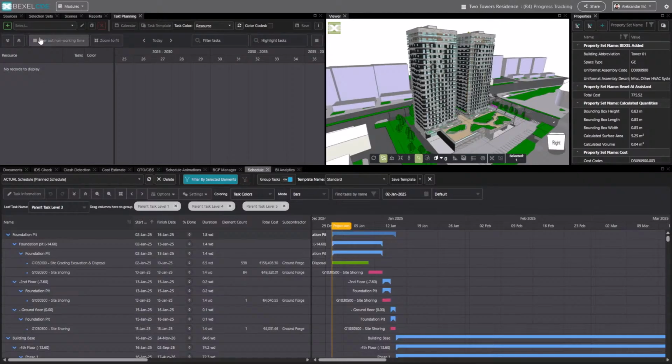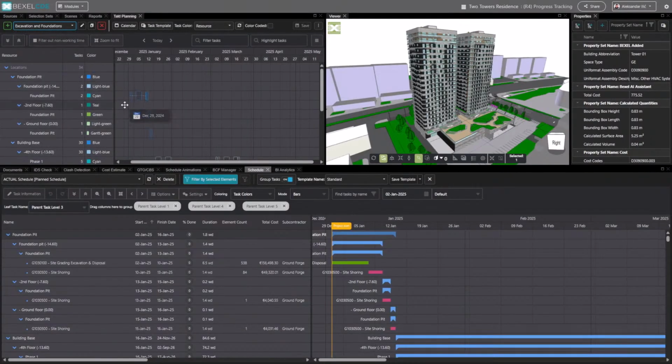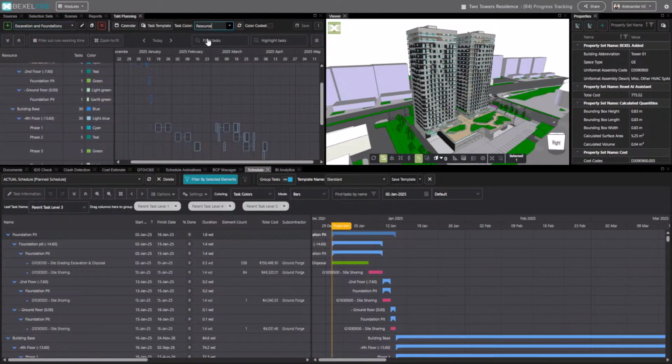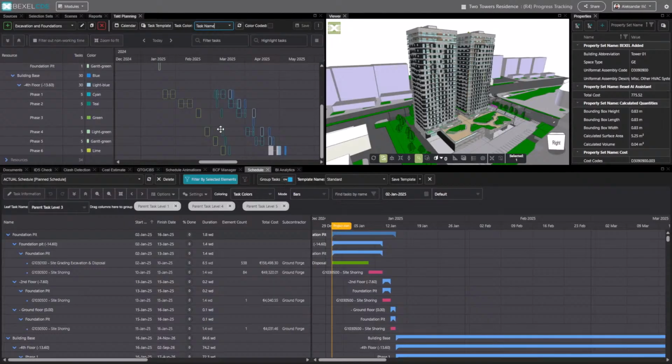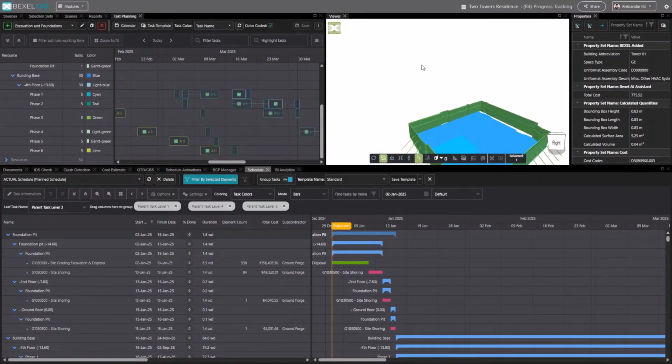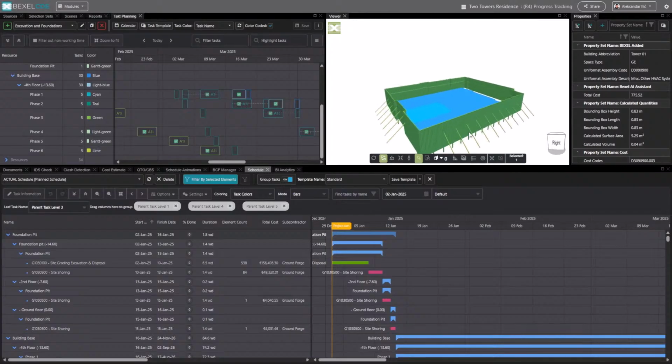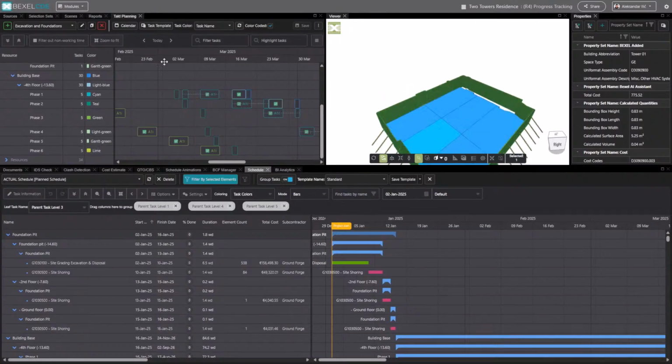Okay, the next step is to go and create the Takt plan. The Takt plan, as you can see from some of the examples that I've already created, is actually a part of the master schedule that is transferred to a specific module named the Takt planning module, where groups of stakeholders can simply take their tasks from the master schedule, put them in their own, what we call canvases, and organize and coordinate them in a way completely independent from the master schedule.